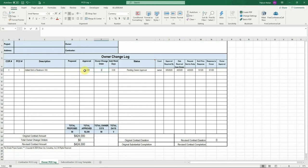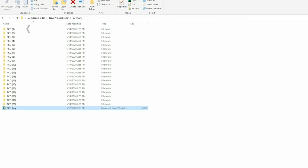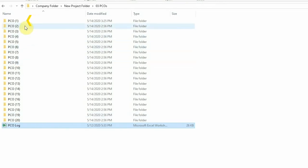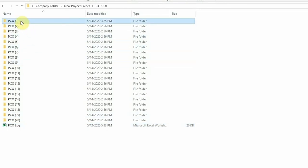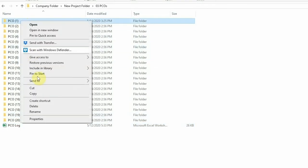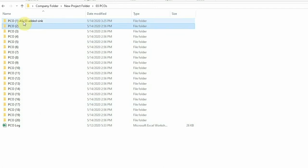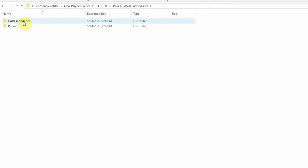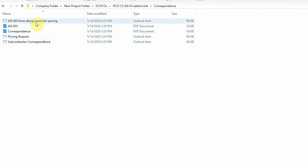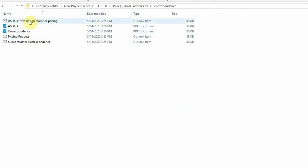Once you've created the PCO in your log, you can create the corresponding PCO folder. Your PCO folder should be the same number as you created in your log. This folder is where you will save any items related to that PCO. This would include emails, documents, plans, requests for information, pricing, and any other items related to that PCO.